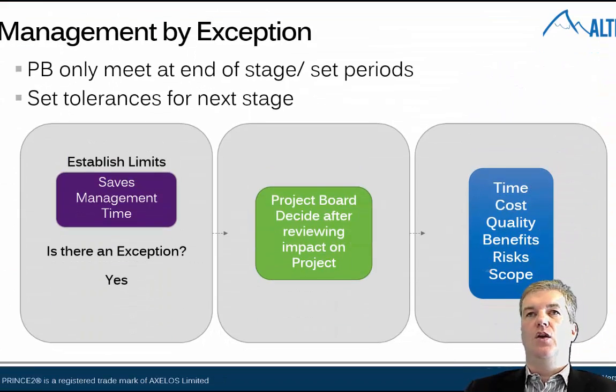Management by exception. Okay, so the project manager within a project is a senior person, and they are given a certain level of tolerances for which to go ahead with the project. And they should not need to go back up to senior management to ask for assistance or to have a chat with them about it. They should have certain tolerances set.